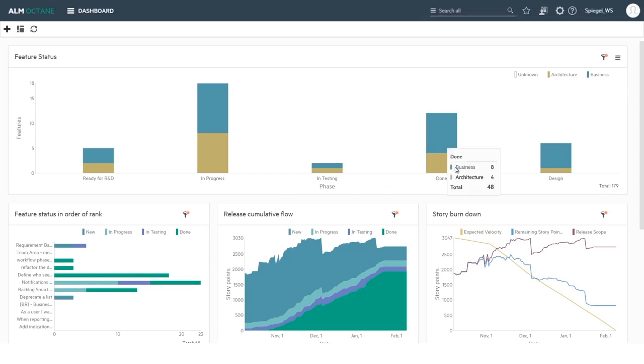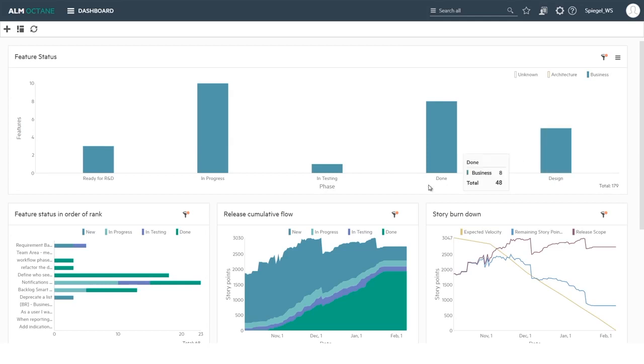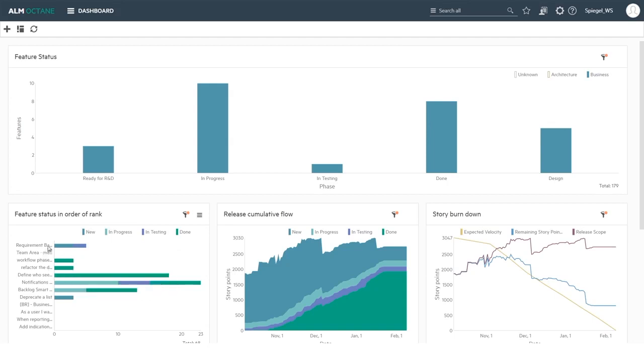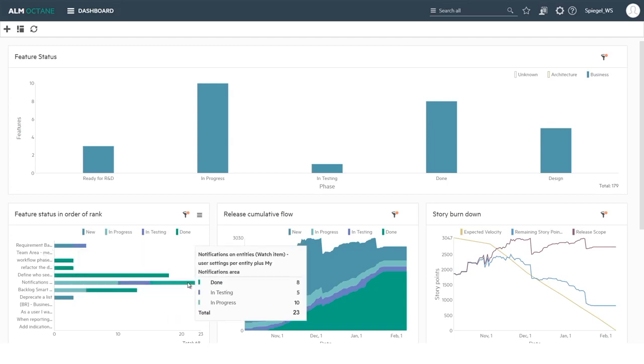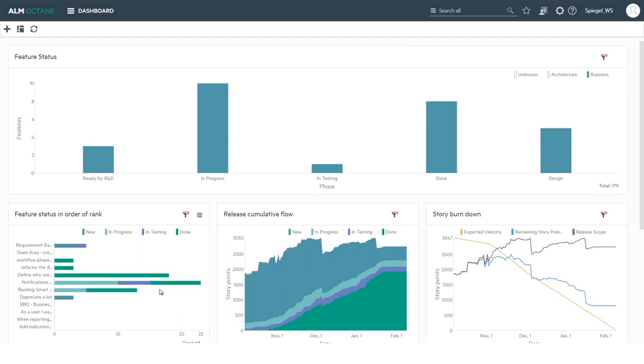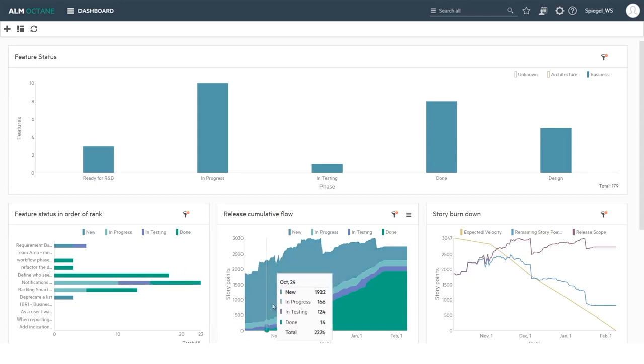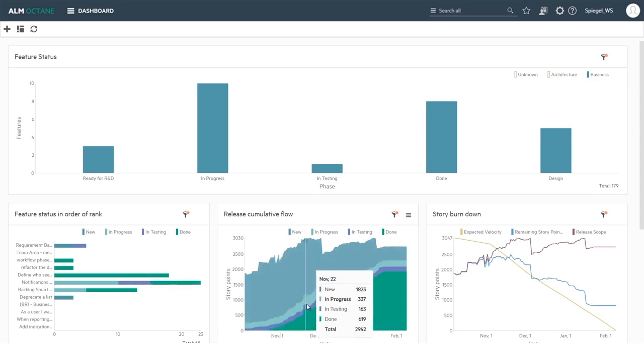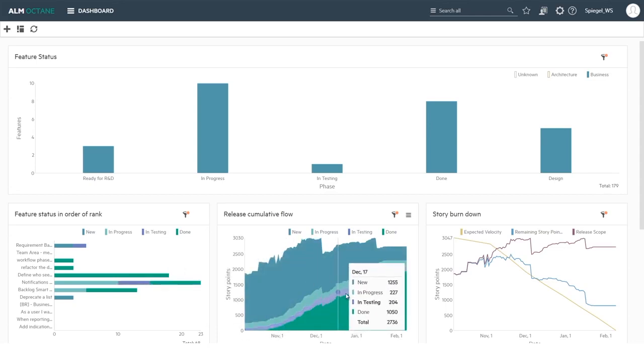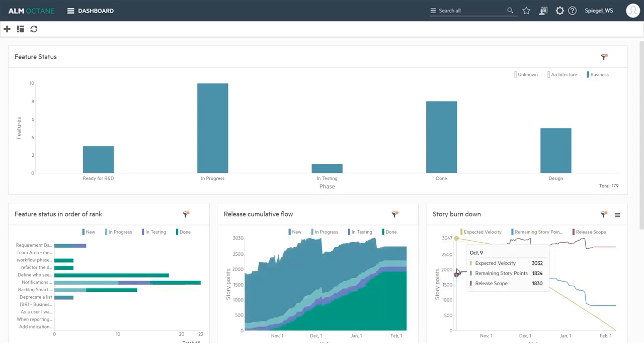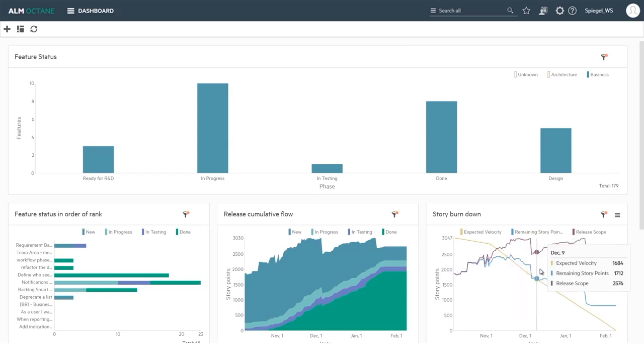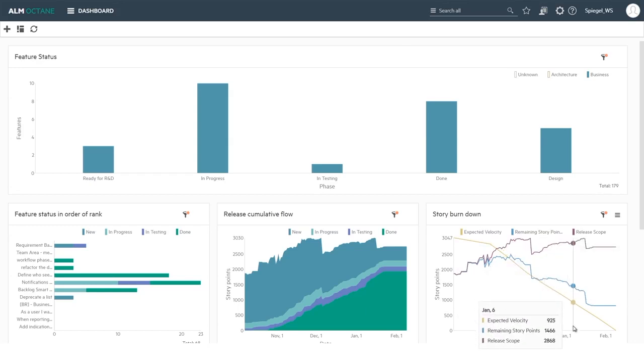I can see the feature status by order of rank and how they are progressing. I have the cumulative flow diagrams across the release of the content being delivered, and also I see the trend graph of the burn down chart. We also have the option of burn up charts and so on.